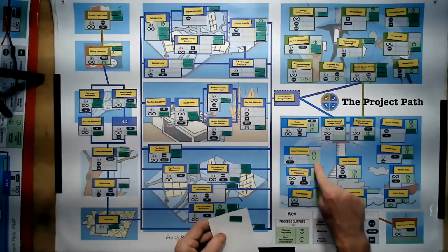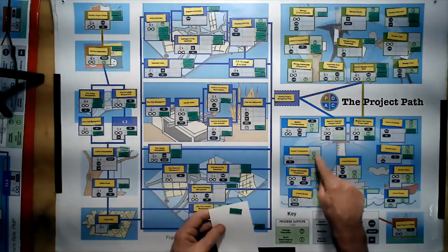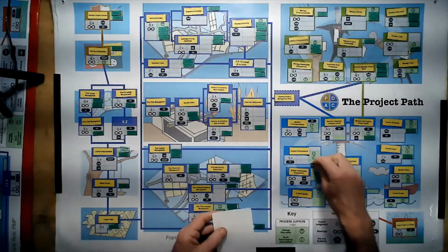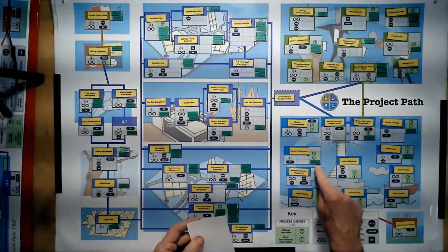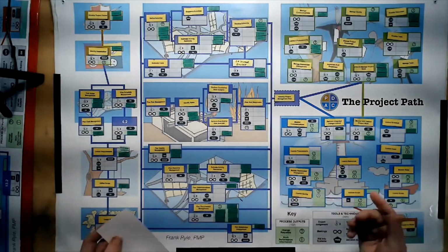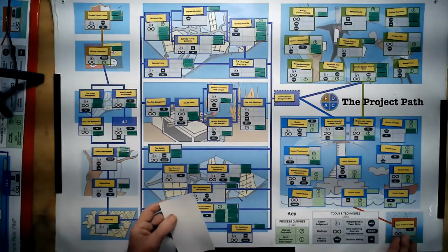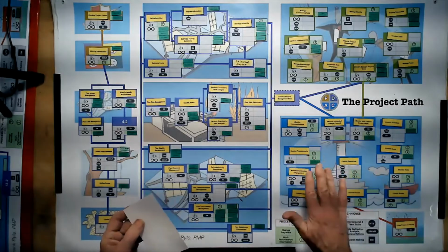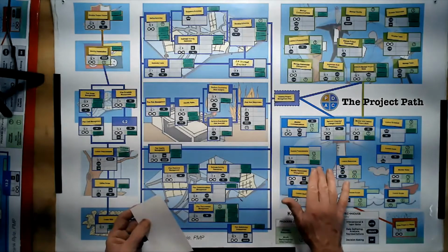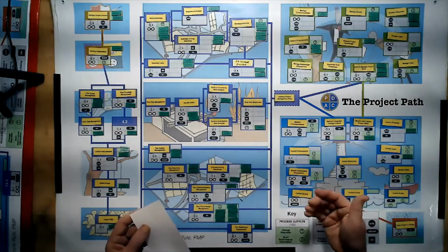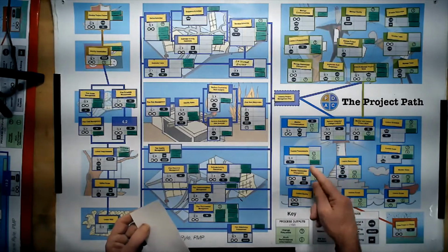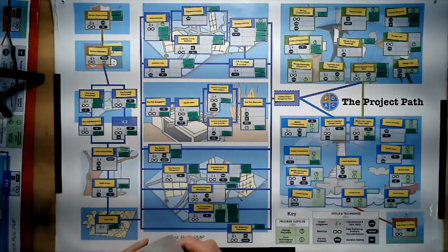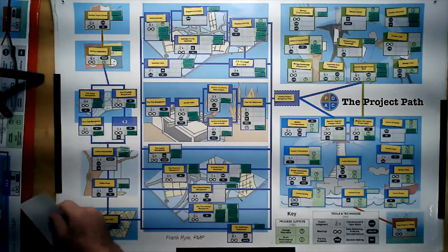When it comes to control procurements, we have the change requests and the work performance information as outputs, but also closed procurements. Closed procurements means that we used to have it down here in closing. In the latest PMBOK, people decided that the project manager is not often involved in actually closing it, but they'll have it as part of that process of monitoring and controlling. And we would do that here.